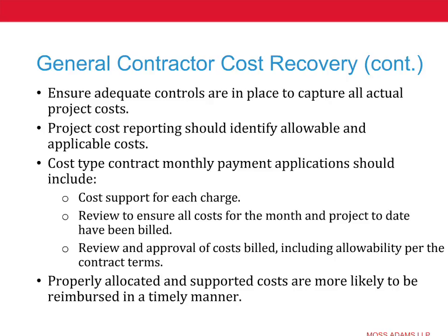So we would encourage you to understand the pool, meaning the numerator, and the base, the denominator, for allocation of costs to your projects. That way you're able to reconcile to historical trends in terms of what your indirect costs are that you're allocating. You're able to ensure that all of your different jobs are picking up the correct amount of cost, and that the rates you're setting for fee are such that there's profit built in and added to the cost allocation, so that you get the recovery you're looking for.